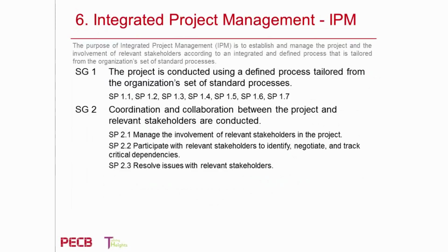There's a question I always ask my clients when I go to their office. I say, what is the definition of a project in this organization? When I ask that question, people start to give me the definition of a project as said in the Prince 2 book or in the PM book guide. But that's not my question. My question is, what is the definition of a project in your own organization? You've got to say a project is something that takes X number of hours, that must be delivered by this criteria. That is when it becomes a project.